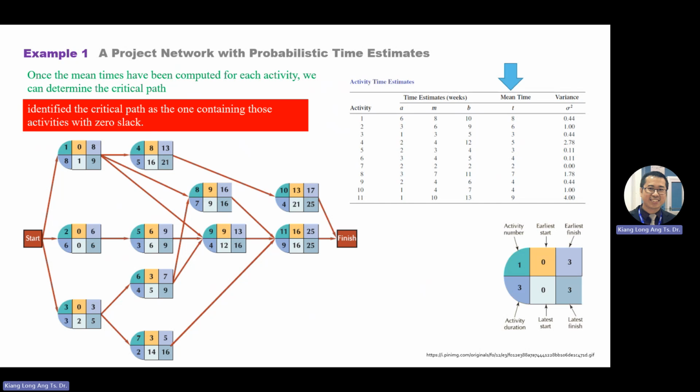Yeah. So sometimes you have 2 arrows arriving, a bit tricky. Sometimes you arrive at 2 boxes. Let's say this is 10. Let's say this is 12. The critical time is 12, not 10. When you have 12 here, the number that you should put here is 12, not 10. I need to stress this one. Okay. This is the careless mistake. Usually, if you write 10 here, your backward pass will be wrong already. Means all these are wrong all the way.